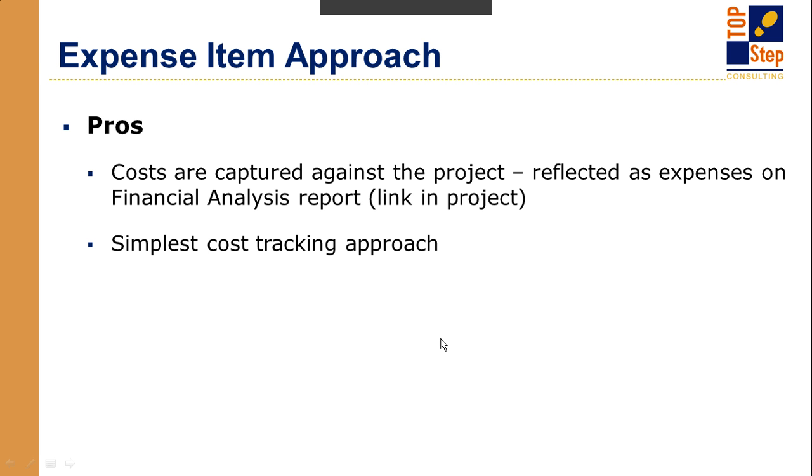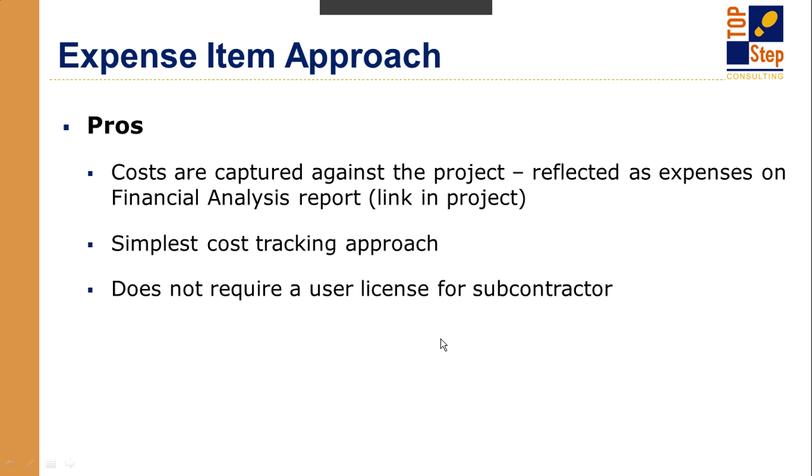The advantages to this is that you can capture these costs against the project. They're reflected as expenses on not only the financial analysis report, but really any report. You can pull them in as expenses, just like your own employees' expenses. It's really by far the simplest approach to track these costs. And it does not require a user license for the subcontractor.